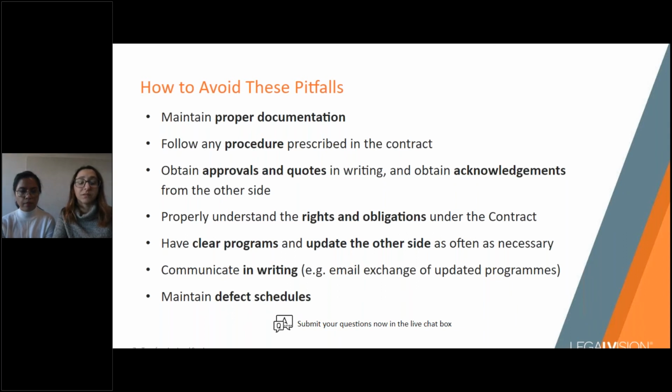Another pointer is to follow any procedure prescribed by the contract. This could include specific procedures like how to deal with invoices. So the contract might prescribe the manner, content, and form in which you need to prepare invoices, as well as who it should be directed to. Another example is payment claims. So the contract could prescribe certain timeframes for issuing those claims and what they should include.